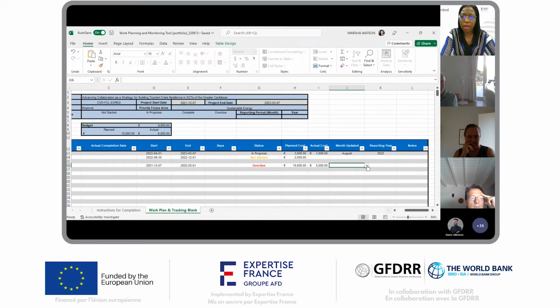And the month that we have updated this is still August. All right. And the year 2022. Now, colleagues, for any activity that is overdue, we do ask that you provide an explanation for this variance, and that is where the notes section comes in handy.